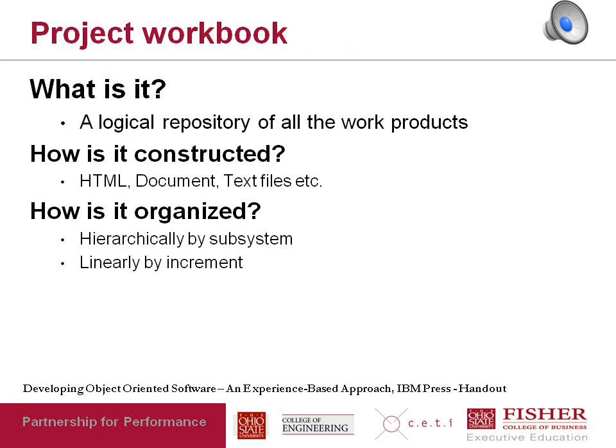This structured process strongly emphasizes what they call a project workbook. So what is a project workbook? It's a logical repository of all the work products. We'll talk about work products in the next slides, but basically it's a repository where all the work products or documents that are created for a project are stored. How might it be constructed? Well, it might be text files, it might be Word documents, it might be HTML documents, it might be source code. All of those are components of the project workbook. And how might it be structured or organized?